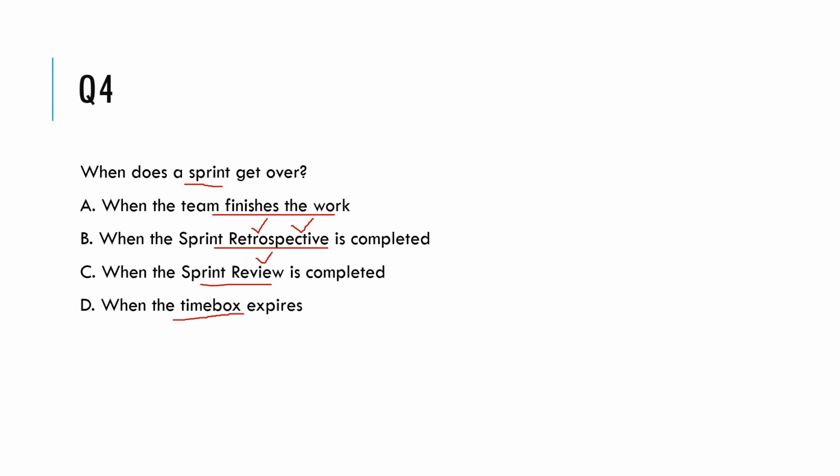So is it okay to say that whenever you're done with the retrospective, you're done with the sprint? Or is it okay to say that when the team finishes the work or when the time box expires? So the right answer to this is when the time box expires. In fact, there are other events in Scrum which also have a certain time box.